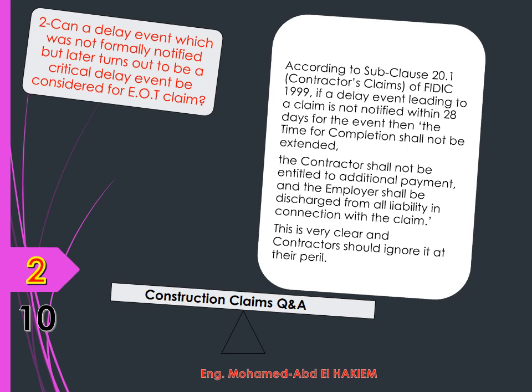Answer: According to sub-clause 20.1 Contractors' Claims of FIDIC 1999, if a delay event leading to a claim is not notified within 28 days of the event, then the time for completion shall not be extended, the contractor shall not be entitled to additional payment, and the employer shall be discharged from all liability in connection with the claim. This is very clear and contractors should ignore it at their peril.